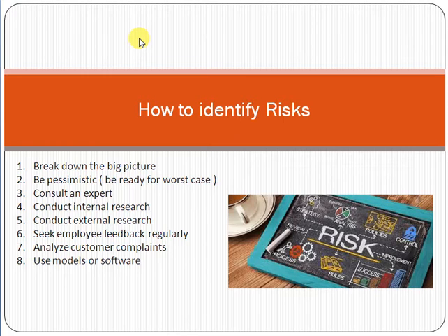For example, friend, if you are launching a marketing campaign for a customer and you have hired a new model, a new face for the marketing campaign, you are unsure, you are uncertain whether people will like that new model or not. If people like the new face after launching the campaign, it will become an opportunity for you because it will boost your marketing campaign. If people don't like the new model, it will become an issue, a huge issue for your marketing campaign.